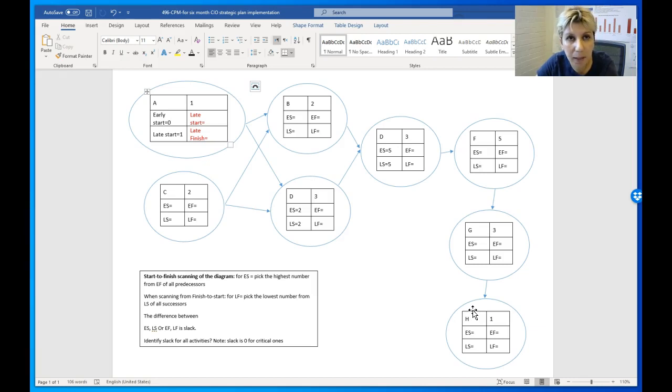So when we say critical path analysis, we're going to look at the longest path from the beginning to the end of the process. That path becomes the critical path. All activities on that critical path are critical. If they are delayed, the whole project is delayed. If they are expedited, the whole project can be expedited. And non-critical activities are those that can be delayed without impacting the project. So if you feel like a critical activity is in danger, you can pull resources from non-critical activities, put them on your critical activities, and save the project.